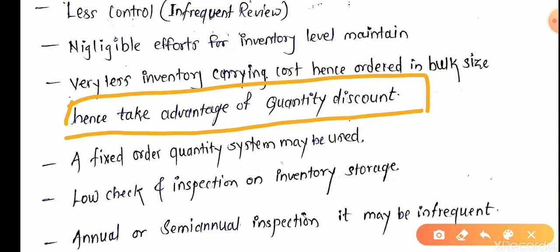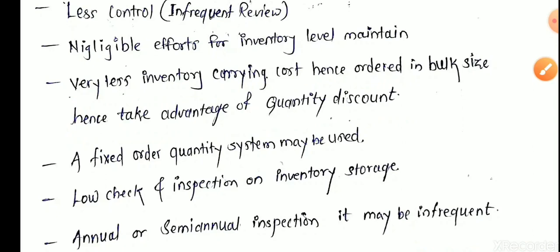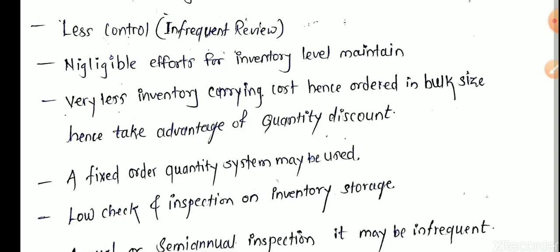Ordering in bulk amount is because of its inventory cost or holding cost. Suppose its procurement cost is much less than the cement bags. Let's take the example. We are holding 1 cement bag for 1 year, and we are holding 1 kg of binding wires for 1 year. We are spending more and more amount on these cement bags because of their storage, holding from rainwater, from other pulverage, from security point of view, and also its inventory cost is greater. Its purchase price is more than the purchase price of binding wires. Hence, we take more effort in storage of cement bags.